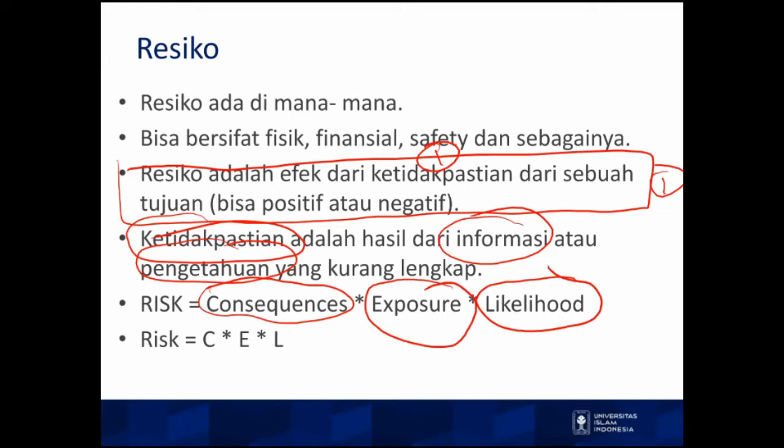In a simple mathematical model, we can say that risk equals consequences times exposure times likelihood.